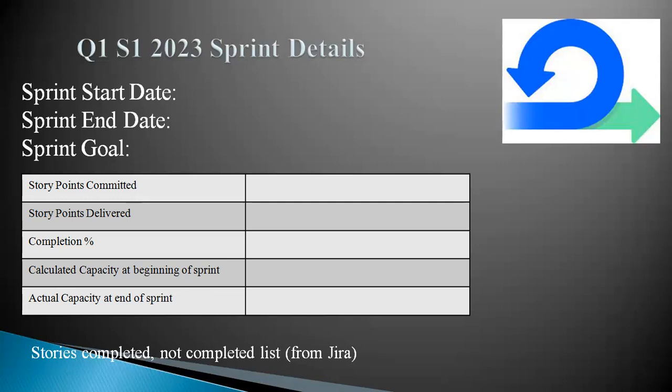You have planned for the sprint, the team has given a commitment for 50 story points based upon the available capacity. Just assume, in the beginning of the sprint, the team was having only 80% capacity. With that, they are fine with 50 story points. Now, at the end of the sprint, consider some team members went on some unplanned leaves or some sick leave. Then in that case, the capacity of the team got reduced indirectly, right?